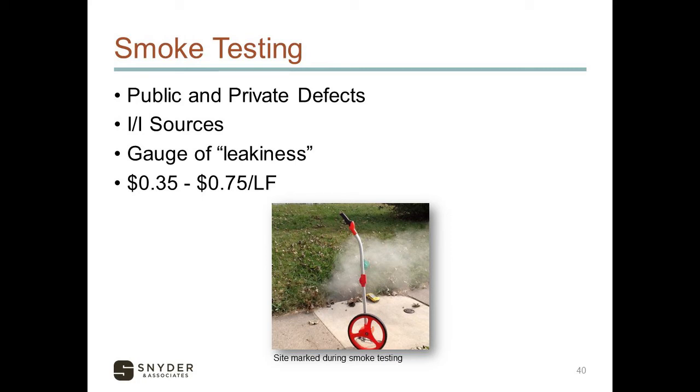Public outreach is key for these type of inspections. Making sure that you coordinate with the local fire department before the inspections take place is critical to make sure that we don't get any unnecessary response calls to the fire department. Just some preliminary price data on here, 35 cents to three-quarters of a dollar per foot basis. That's a pretty wide range, but again, the cost can depend on the scale, the quantity of the footage that you're inspecting, and the location.